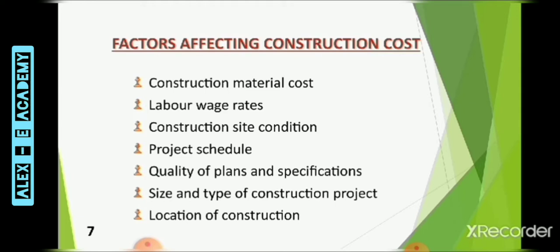The second factor is labor wage rate. Labor wage varies from place to place. If the project has to be started after several months of estimating the project cost, the probable variation in wage rate has to be considered in the calculation.